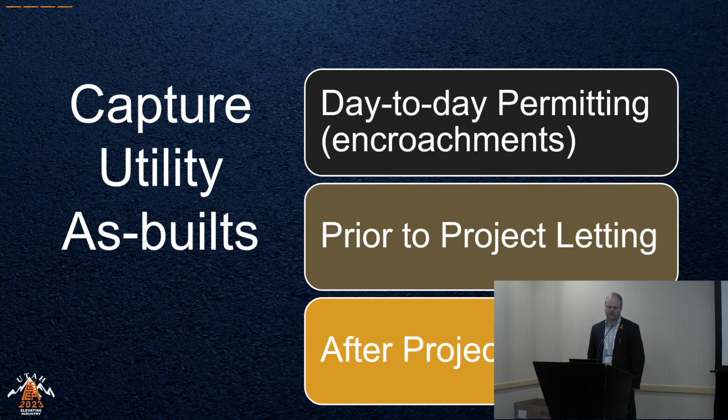Prior to project letting, we're probably a little bit better at that, and that's something that'll play into the digital delivery effort quite a bit. We have our SUE providers, and we can scope some as-built data into our SUE deliverables. So as the utilities are adjusting, we have TxDOT contract forces out there capturing that data, uploading it and putting it into our plans. And then after project letting, TxDOT has a solution for municipalities and other utilities to be joint bid as part of the PS&E package. And so we're usually, and I say usually, getting pretty good data on those as-builts as well.